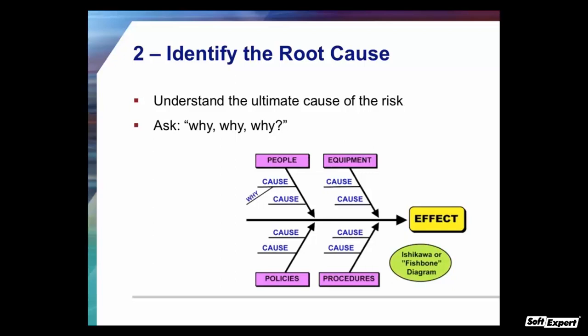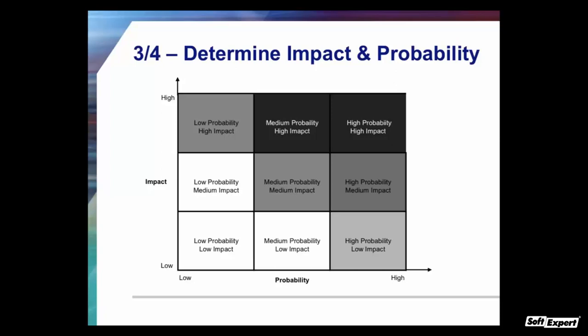Steps three and four are to determine the impact and probability of each identified risk. The worst risks are those with high probability and high impact — in the top right-hand corner. The top left-hand side shows low probability and high impact — risks that might not happen but, if they do, will have a big impact. For instance, it's very unlikely your building will disappear due to a bomb, but if it happens the impact is major — that's why most companies have disaster recovery and backup plans. There's a very low probability, but the impact is so high that we do something about those risks.